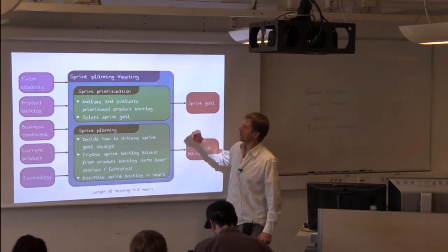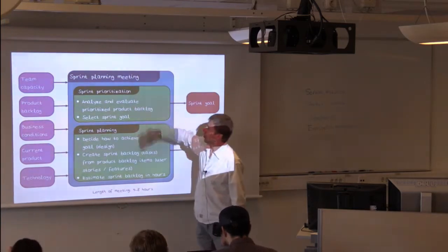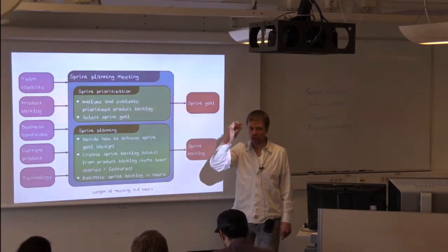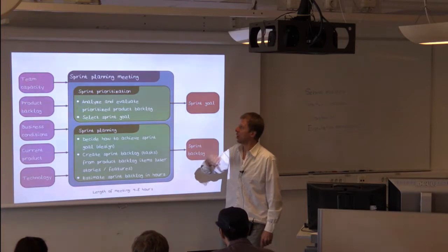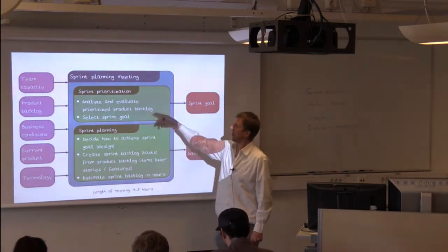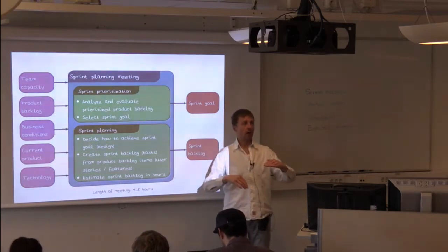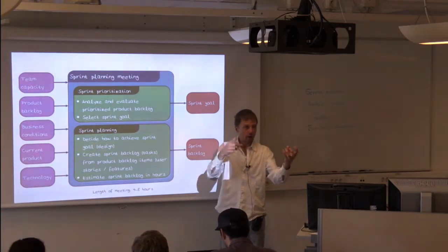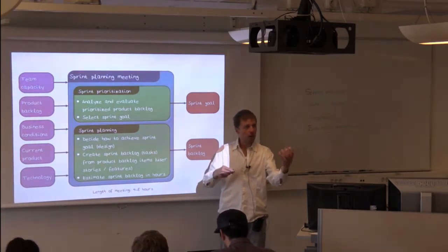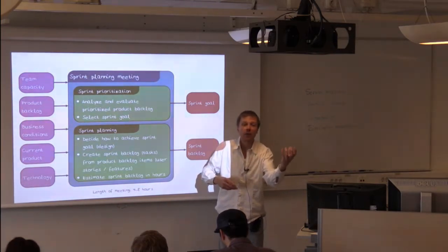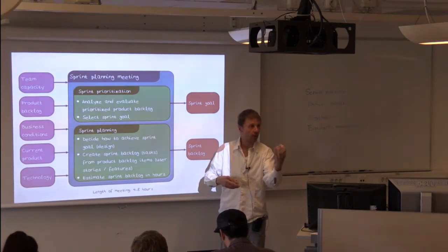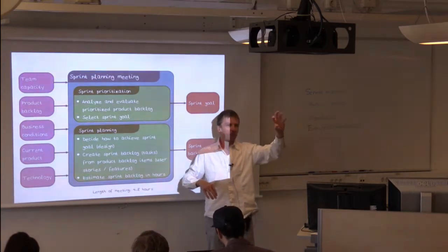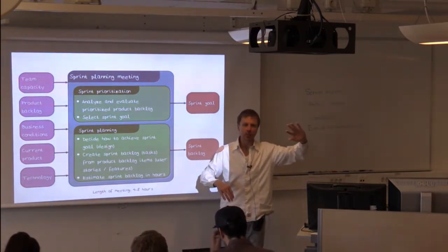Prior to the meeting, as I said, the product backlog, the stories, the features are prioritized by the product owner. So what happens in the sprint planning meeting is that the team looks at this product backlog, right? They look at these stories and talk to the product owner, who is in this meeting, about them to make sure that they understand what the product owner wants to accomplish with this particular feature, right?